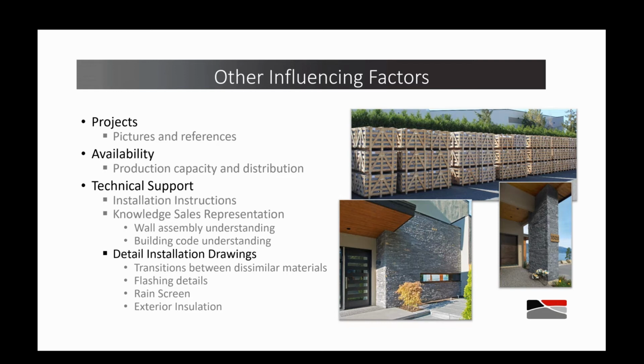We often find ourselves in situations in Canada where products are specified that are either coming from way out east or from other parts of North America, and they're just not readily available in the area where the project's taking place, and that can cause some problems. So asking some questions around that is always useful as well.